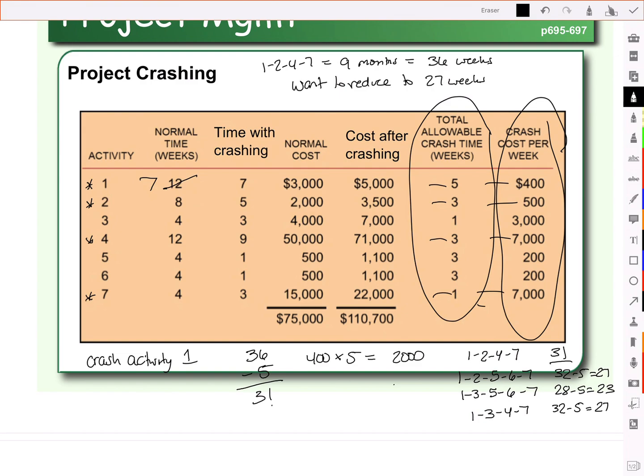Speed it up. So notice we can crash 3 weeks. So let's take our 31 weeks, and we'll subtract from that 3 more weeks. So 31 minus 3 puts us at 28. And the cost of that will be the $500 times 3 weeks, or $1,800.